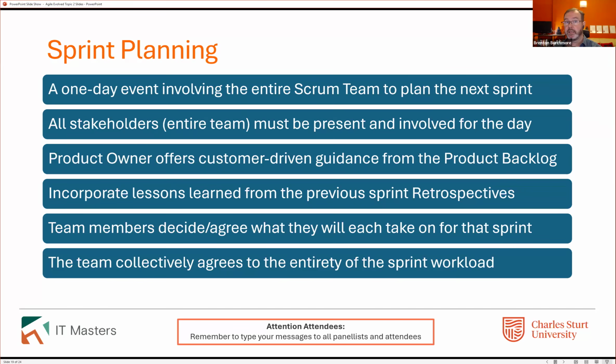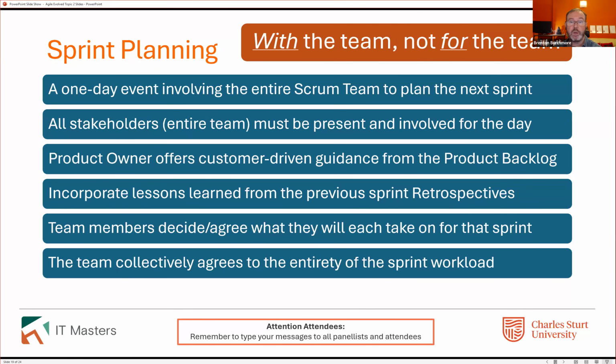Then the sprint happens and nobody touches any planning unless an emergency happens. And then that's the Scrum Master to say, okay, as an emergency, boot this problematic user story off, or pull another one in because, wow, you're super efficient. You got everything done. You got 3 days spare. Find something else to do from the backlog. But we plan with the team, not for the team. Team is joining these decisions.